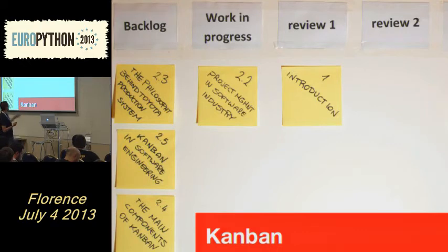And of course, you define your board. There's this concept, the concept of WIP. At a certain state you can have a certain limit of tasks. You cannot have more, and so on. So it's very easy. You just move the task between the columns. It's easy to adapt. It can be useful not only in the IT sector, of course. You can use it wherever. Personally, I'm also using it for some personal things that I'm doing, and it fits perfectly.